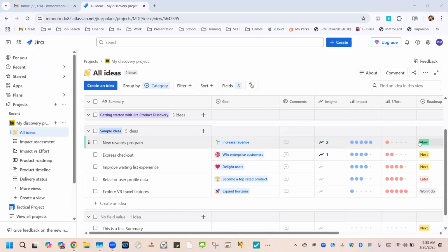The impact versus effort. Now, as you guys know, if you've been following me for a while, a lot of what I do is a scale of 1 to 5. Generally when I'm working with my clients and stakeholders, I will get to a data-driven process to prioritize things. The very simple process is this. I will say to them, on a scale of 1 to 5, what's the value? 1 to 5 being the greatest, 1 being the least.